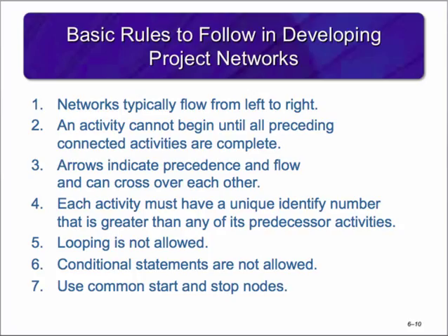Arrows indicate precedence and flow and can cross over each other. 4. Each activity must have a unique number that is greater than any of its predecessor activities. 5. Looping is not allowed. 6. Conditional statements are not allowed. 7. Use common start and stop nodes.